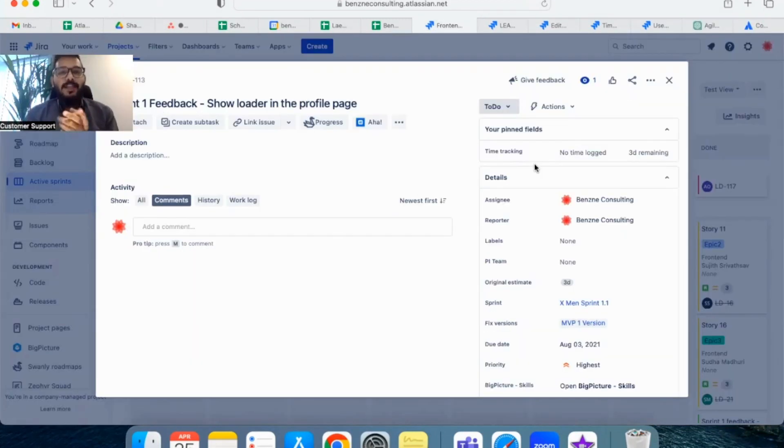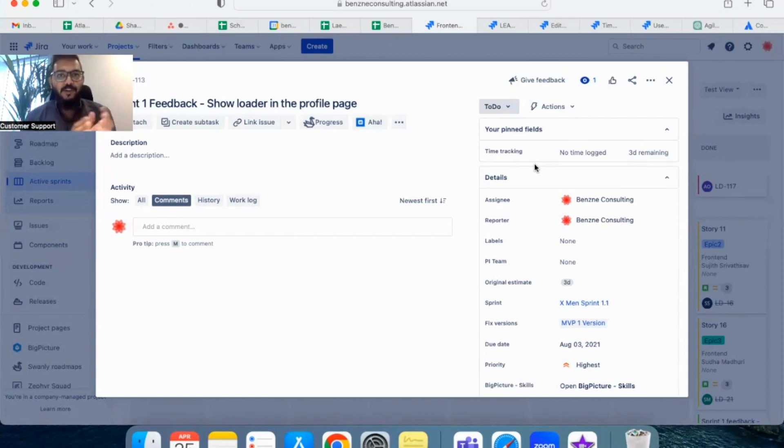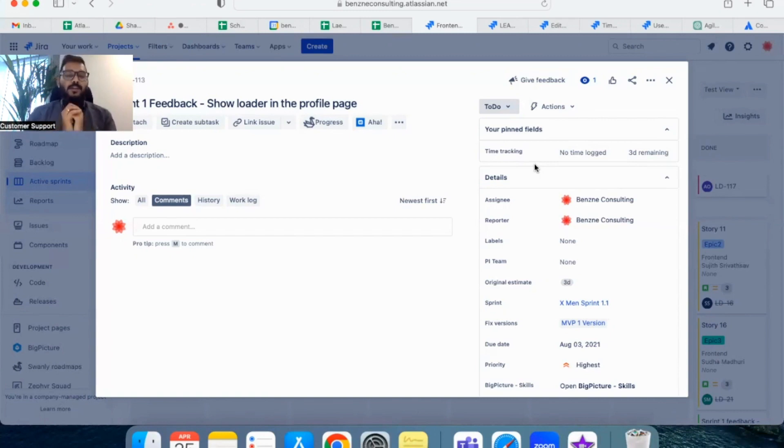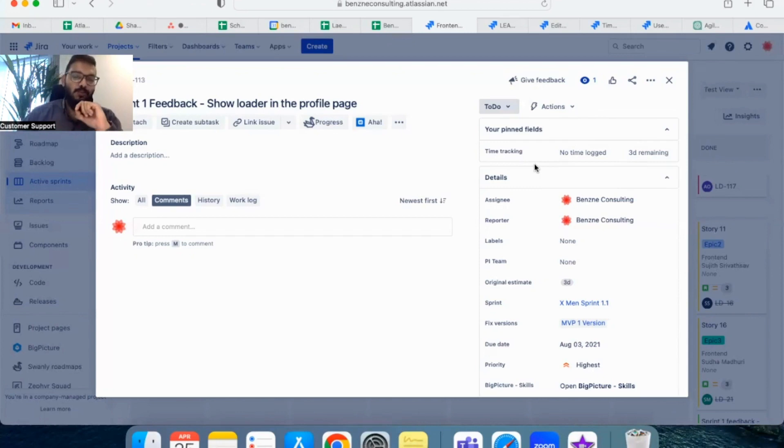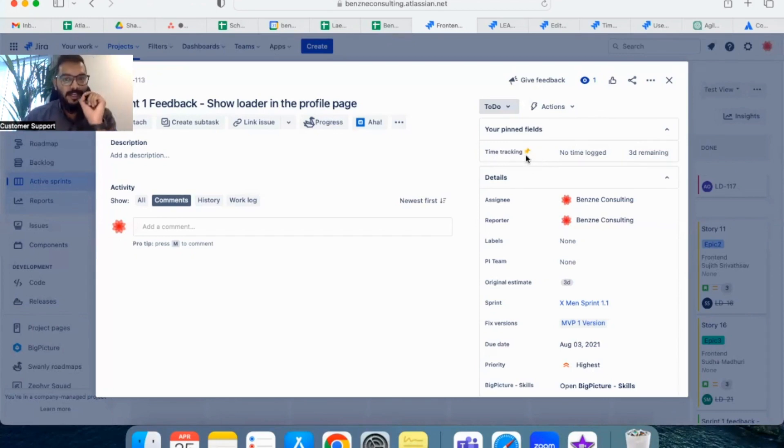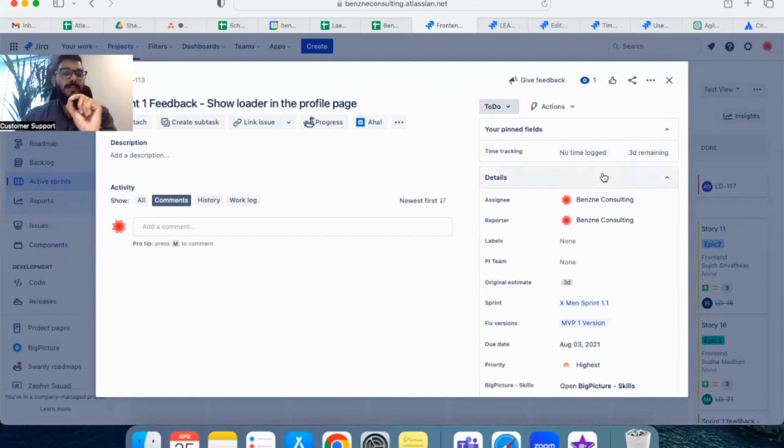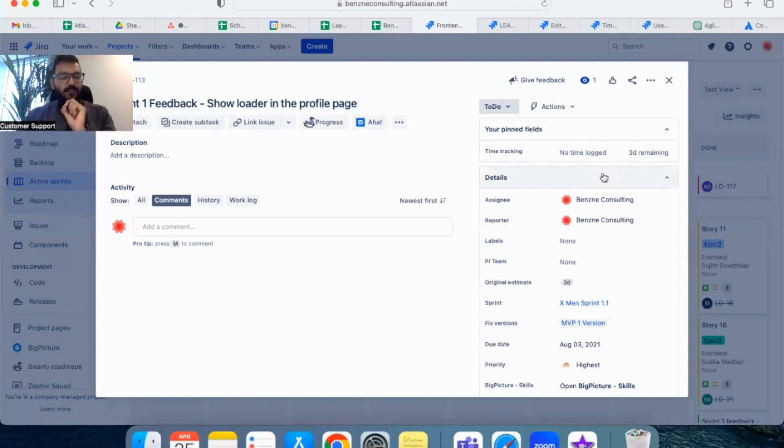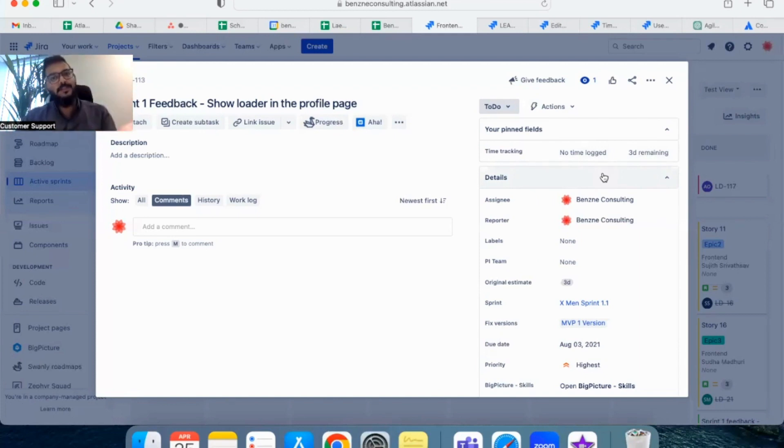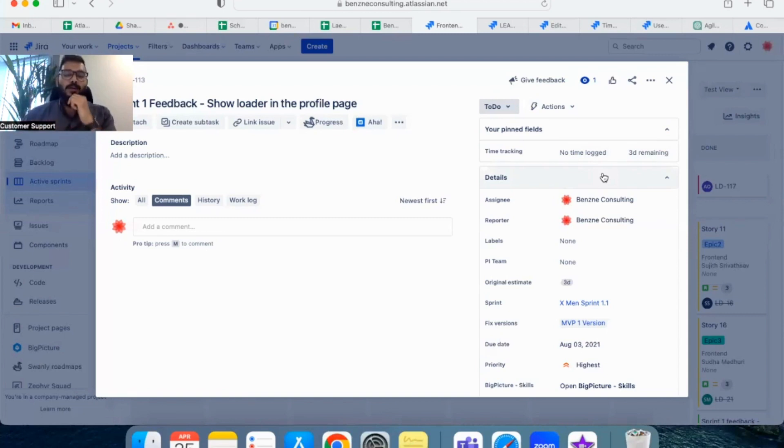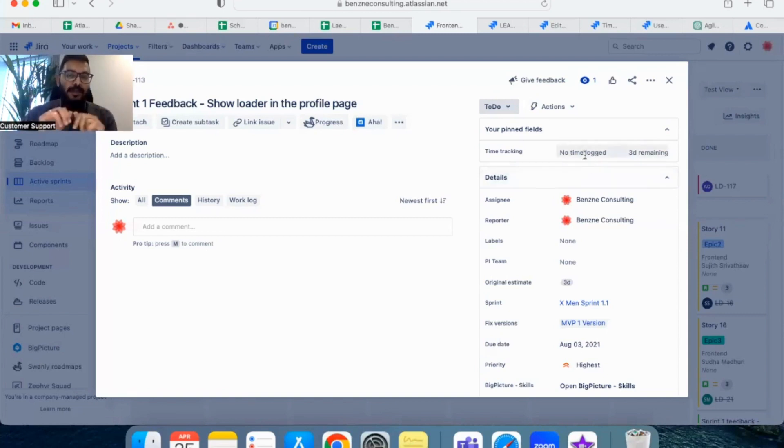So once you have enabled time tracking permissions in your settings, any issue ticket type in your project will have that field also visible. If you can see my cursor, you can see the time tracking field where when you're creating a ticket you will be able to exactly put the estimate in terms of hours, days, or weeks. Also, when a work item is getting completed, a user or any team member can input the time spent on that particular ticket.